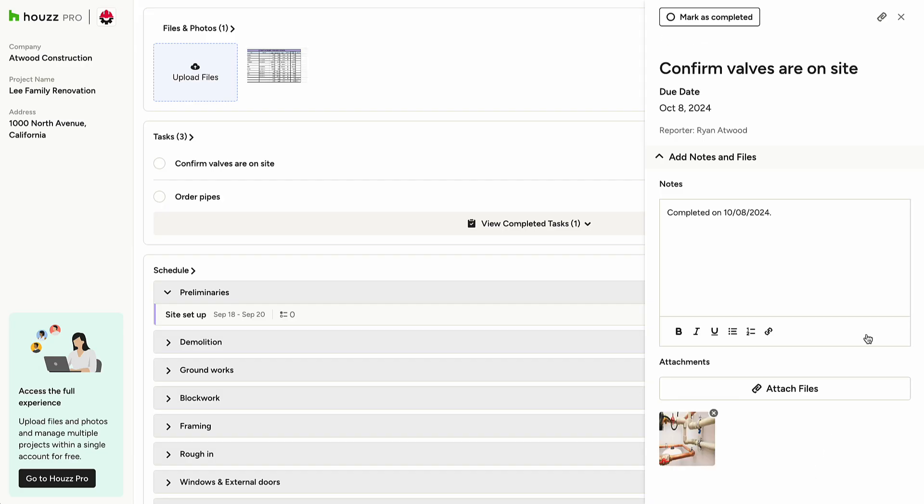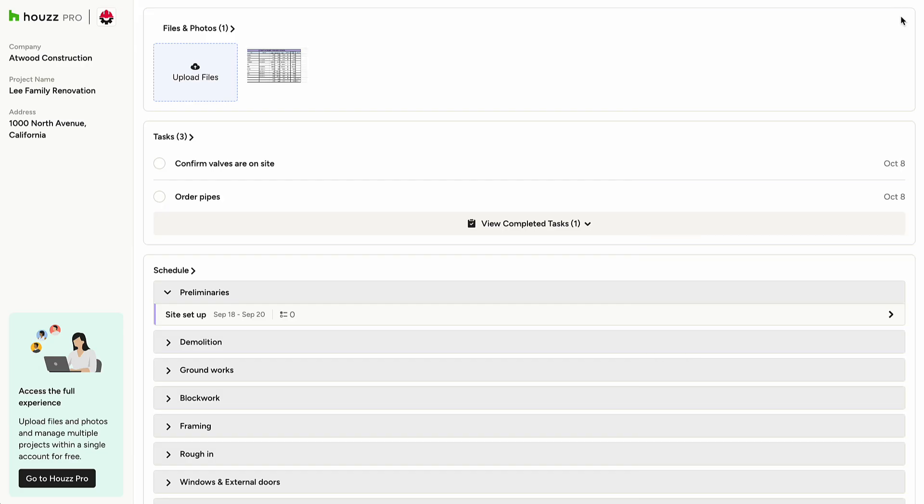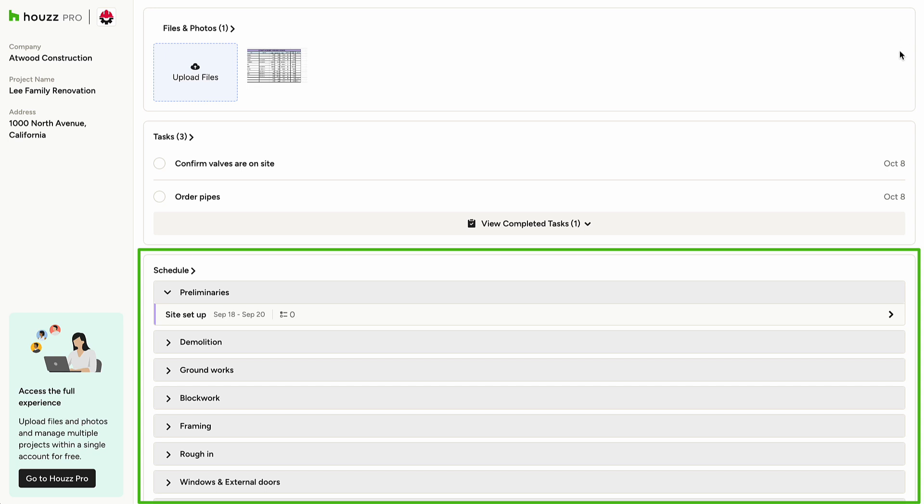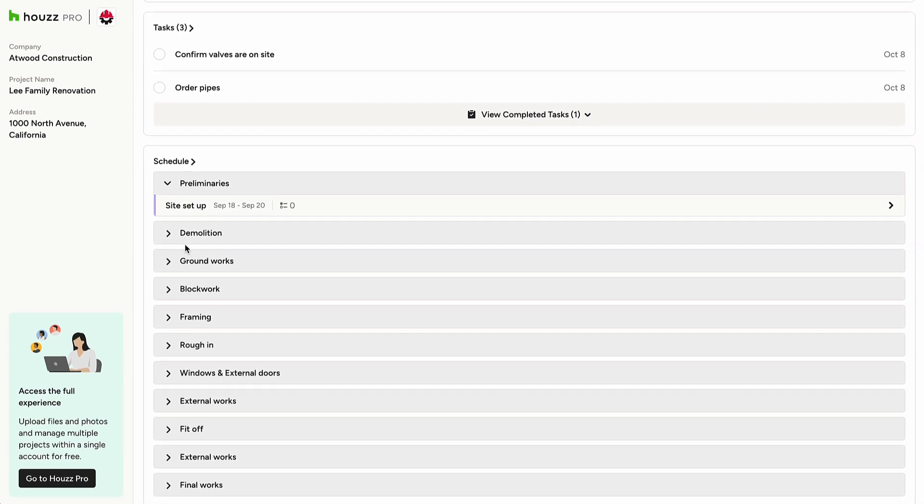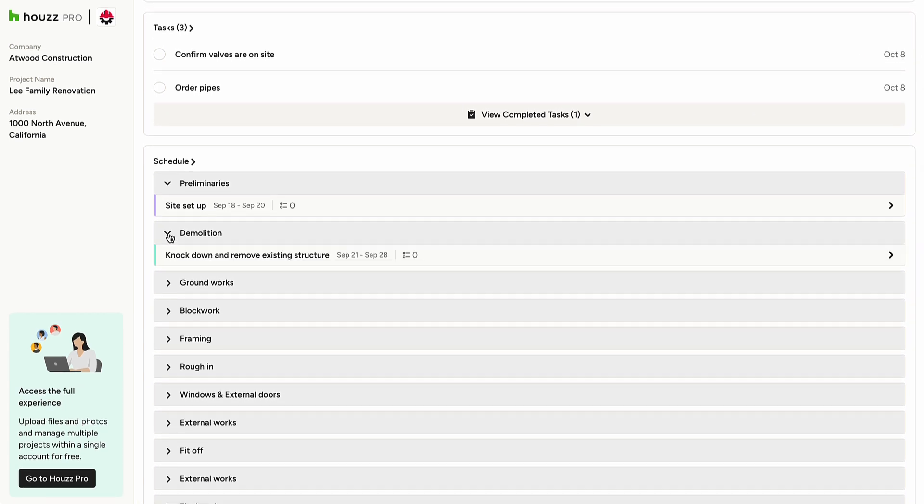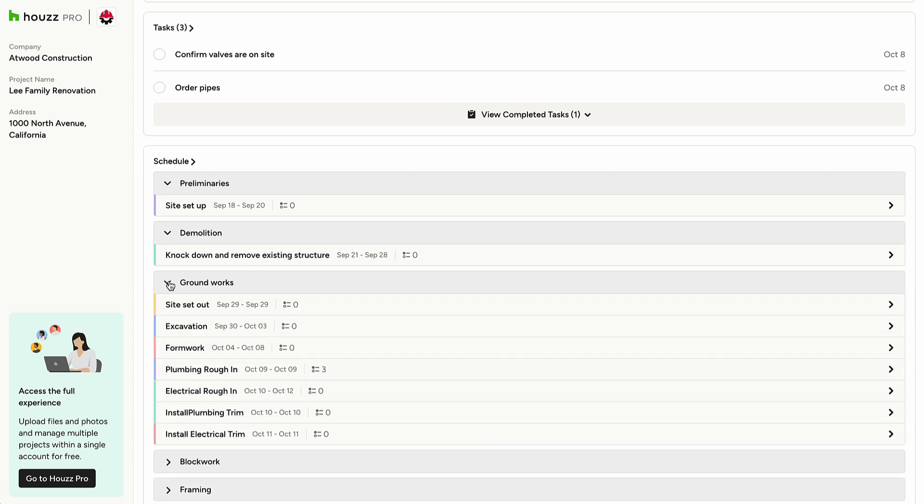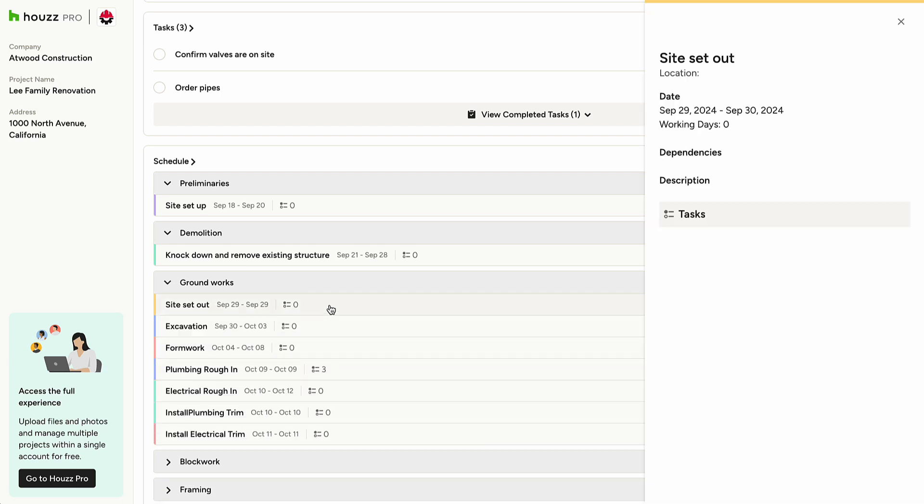The schedule section displays project schedule items assigned to you. Click on any item to view and mark as complete. If the pro you're working with shares their full schedule, you'll see an overview of all upcoming items. Click any item for a detailed project timeline.